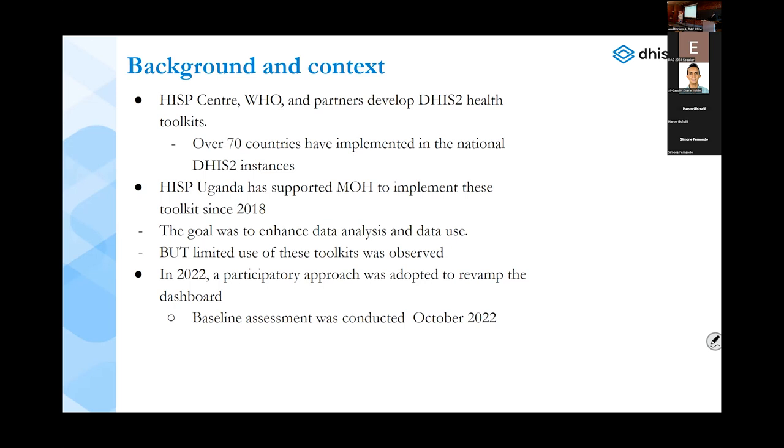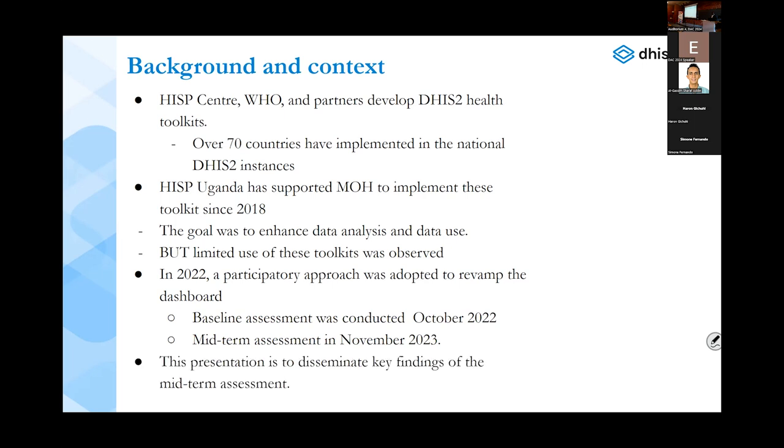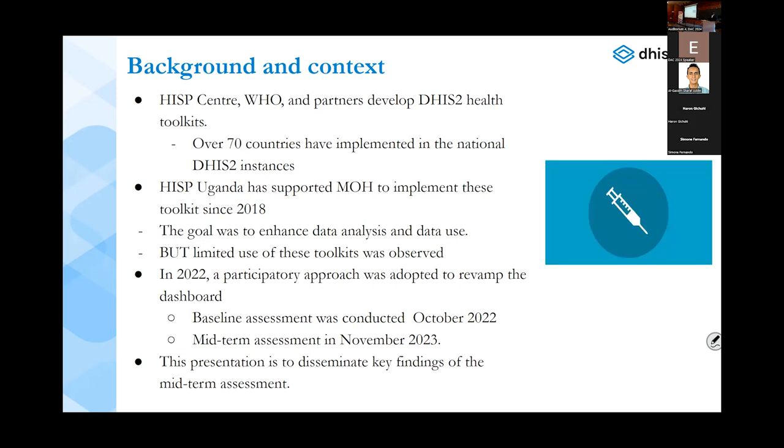So we did a baseline assessment. In October, when we had already made this revamp but hadn't deployed it, we did a baseline assessment. Now, a year later, we are doing a midterm assessment, and we are hoping to do an end line to close this. So for this presentation, I'll be trying to present results that compare midterm and baseline to see if we've had any improvements.